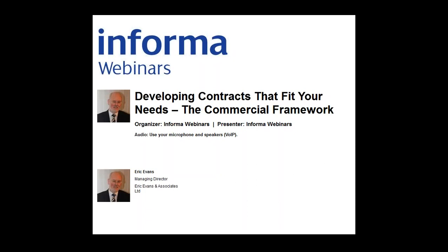One of the government contracts that we're looking at the moment, there are lots of words within the contract, such as, in the event of a dispute, the parties will agree on a sensible resolution. I ask you to stop and think for a moment. What does "the parties will agree to agree" actually mean? It actually means the contract does not define what the customer wants and how that difficulty with the supplier is actually going to be resolved. There's another clause which says the outcome of a dispute will be as defined by the parties.